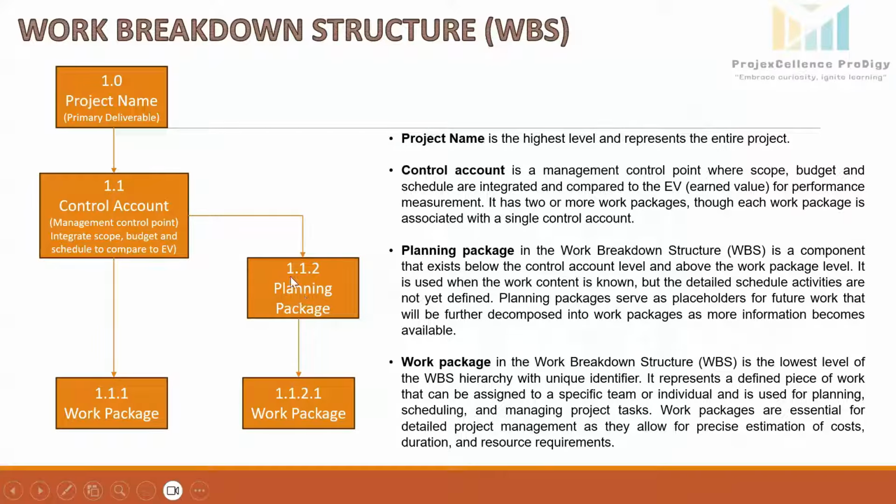Planning package, this layer. The planning package exists below the control account and above the work package. So it is an intermediate level in the WBS hierarchy, not as detailed as a work package but providing more information than the control account.